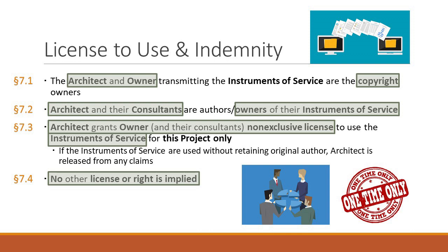Last part of this provision that's important. The architect rightfully terminates this agreement for causes provided in 9.4, and that's just basically I don't get paid or the owner's in breach. If I, the architect, terminate, I fire you, owner, this license goes away.